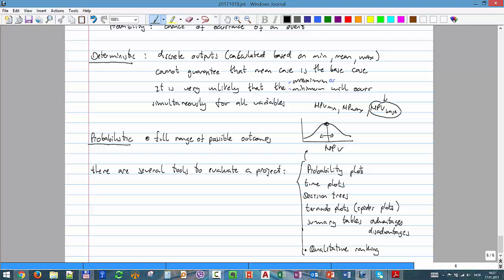When you have things that have advantages and disadvantages, you try to assign a value to each characteristic, and then you sum how many points each alternative has. That's a way to give a numerical value to something that is qualitative. Let's put that small comment here.